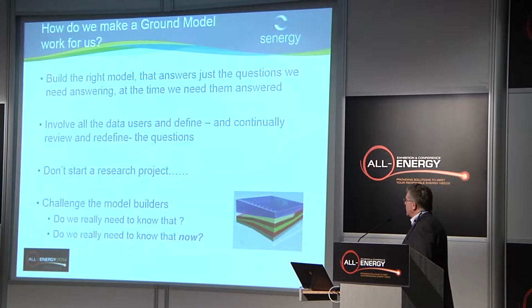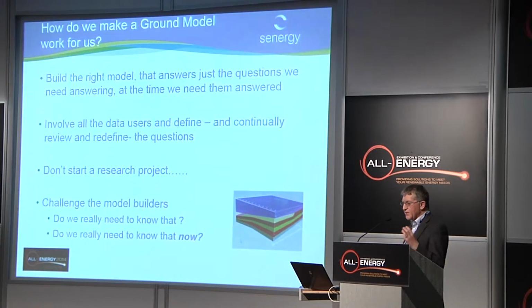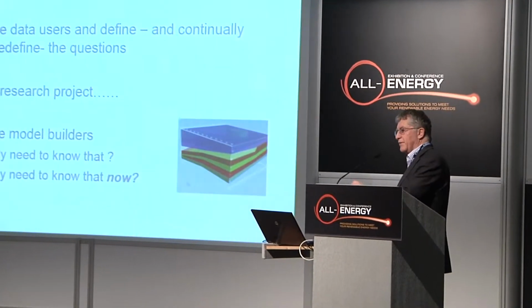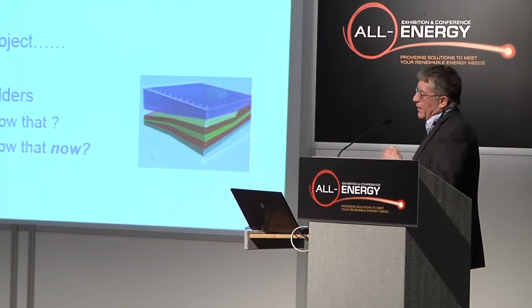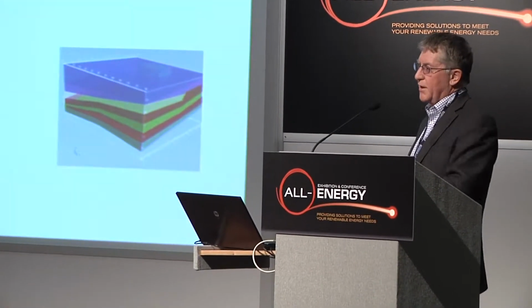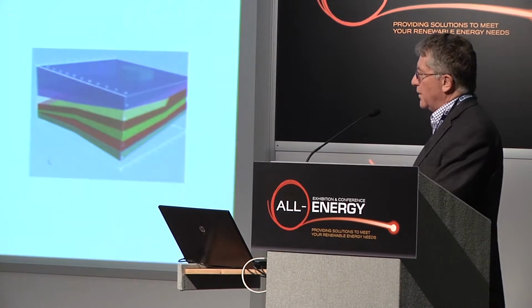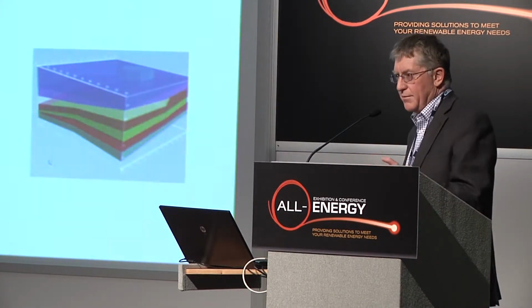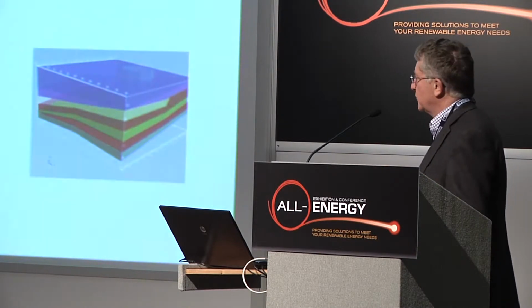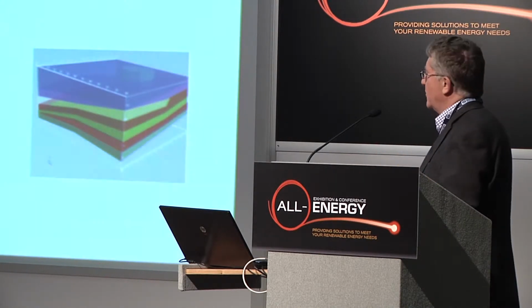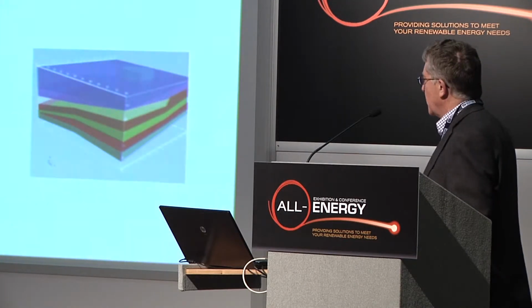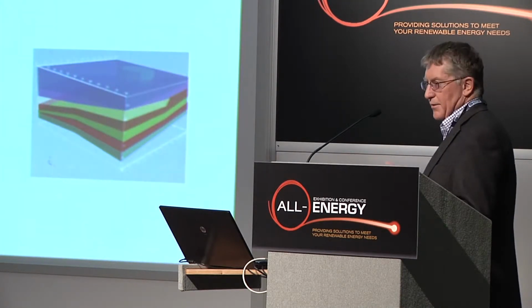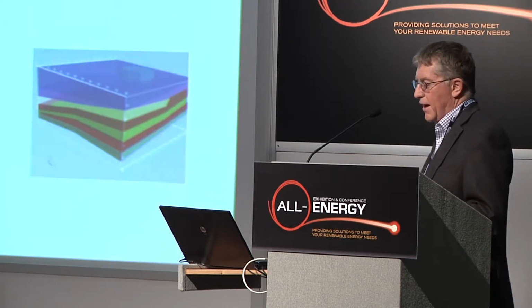We need to involve all the data users to define and continually redefine the questions as we go through the process, because whilst we're doing this site investigation, the wind farm development engineers will be choosing their equipment, wind turbines, foundation types, etc., and the evolution of new technology into the market will change that situation as we go. So we need to keep pace with this and be prepared to change our plans as we go along. And we need to then challenge the guys building these models. Do we really need to know that fact, and do we really need to know it now?